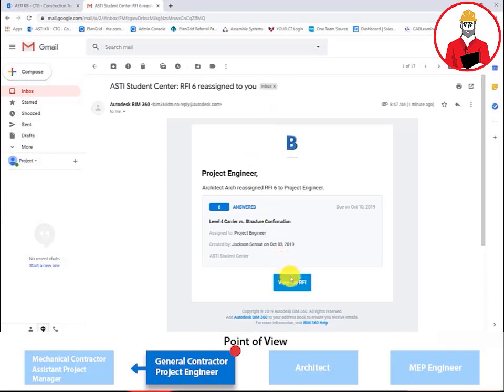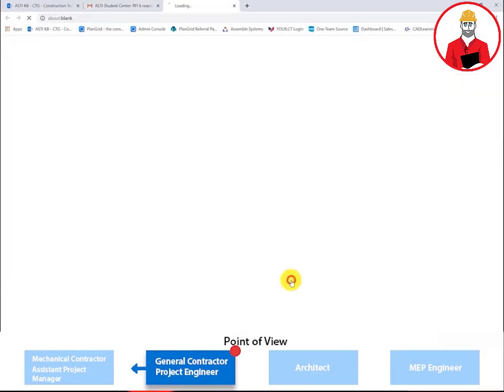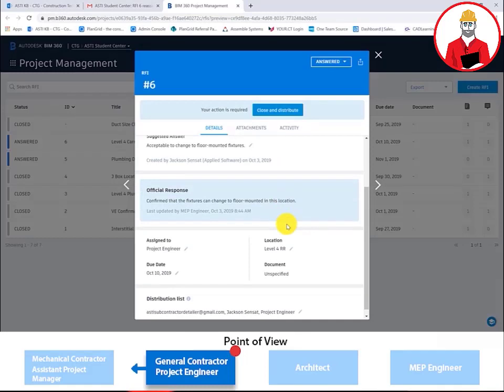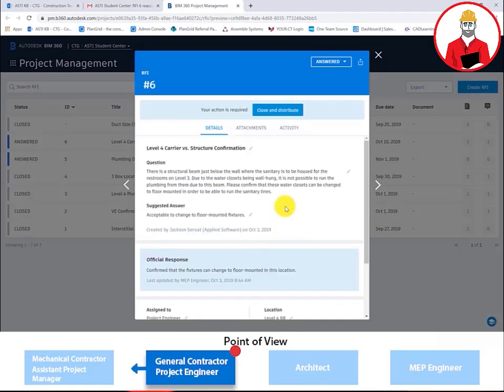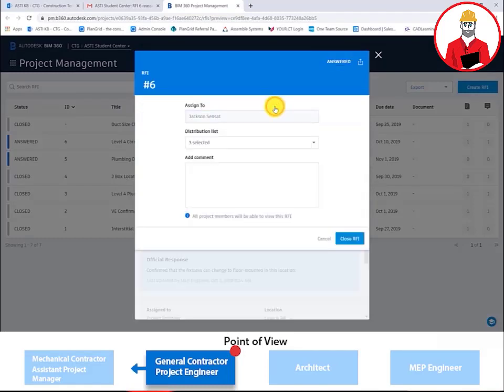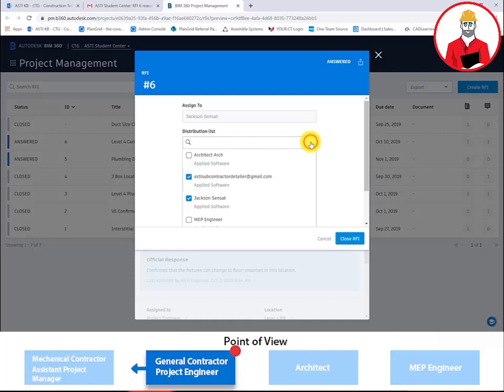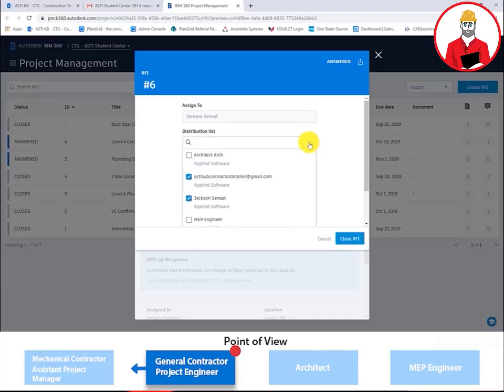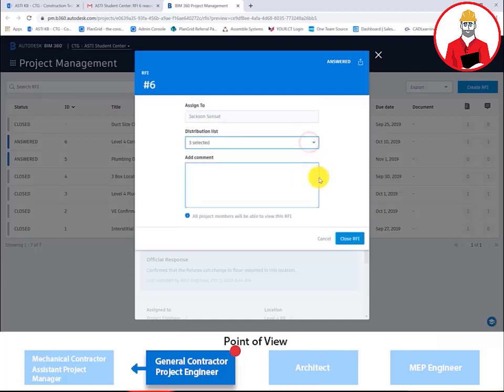The project engineer is notified via email when the RFI has been answered. From there, the project engineer can review the answer. This is great. Now that I have the answers back from the plumbing engineer, it's exactly what our mechanical contractor is asking for. I'll go ahead and distribute this to the relevant parties.